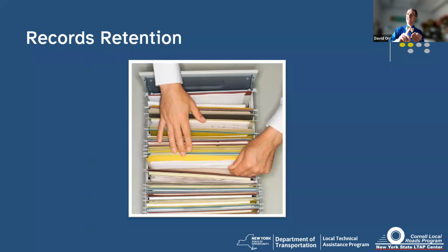and realize if it's part of the structure, if it's part of the road, if it's an engineering activity, you need it till 3 years after the structure or the road is gone. How likely is the road to no longer be there? So pretty much you may want to think about engineering records, as-built, things like that. They're pretty much permanent. You got to keep them pretty much forever. And that's not just for federal aid, that's for any project. You really want to think about that.